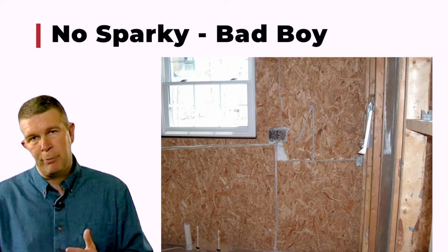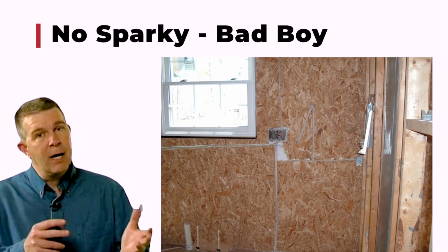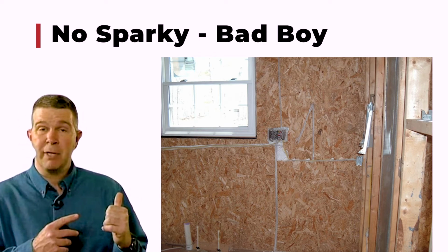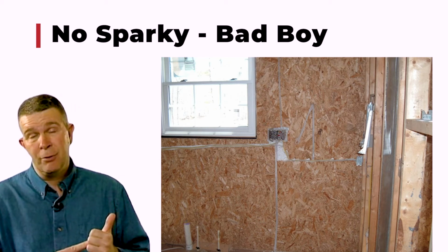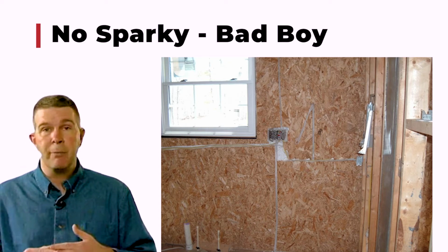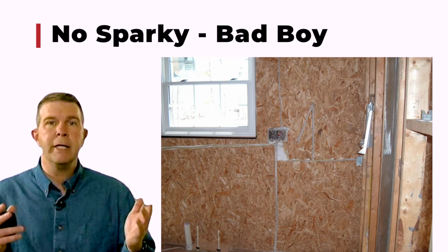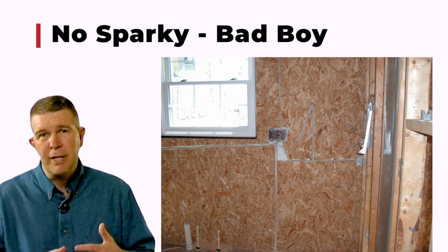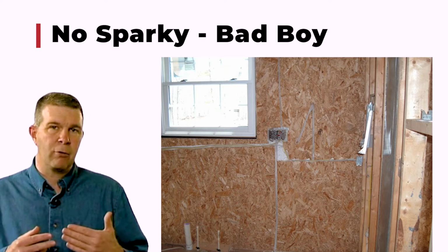Now, if you don't have that pre-planning meeting, if you don't work with your electrician, if you don't have the tools and the techniques and the understanding about how to move wires through walls, this is the kind of thing that can happen, and this is what you don't want to see. This involved an electrician who never got any training, didn't know how to get his wires from point A to B, so he simply grabbed his router or his skill saw and started grooving the panels anywhere he needed to run a wire. He literally has destroyed the panel from a structural standpoint because he's now created what would be a hinge joint in this panel. It's lost its ability to handle that lateral load.